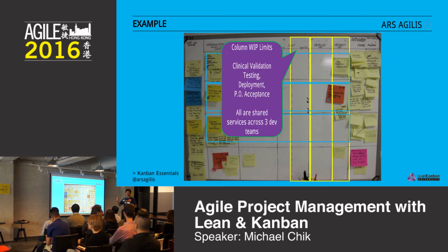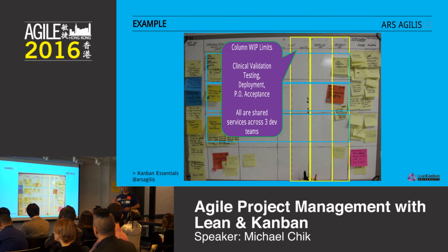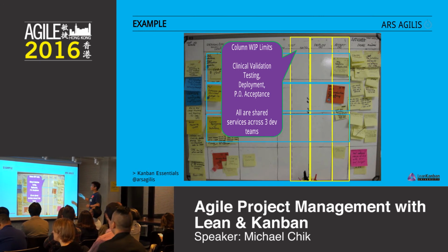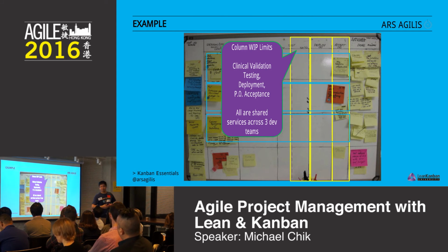And Kanban works really well if you have what we call shared resources. For example, you have 4 teams, but only one designer. How do you work with the designer? Scrum doesn't give you a good solution. Here we limit the work that the designer can do.